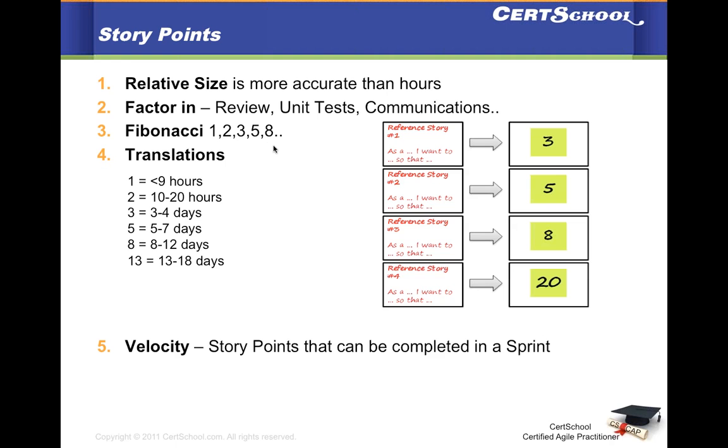If it is a little bit over 8, jump it to 13. That's the Fibonacci technique of using story points.